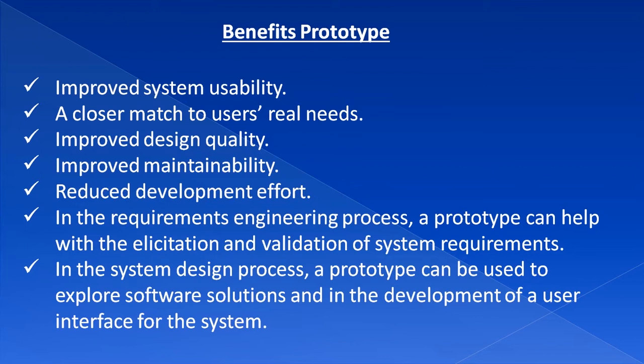So when you are providing a prototype and asking the customer to use it, you can look into the way they use the software and you can avoid unnecessary functionalities which you are about to provide, right? You may talk to them that you are not using this functionality. So this is a waste of resources and cost, and you can cut it off from the requirements definition, right?